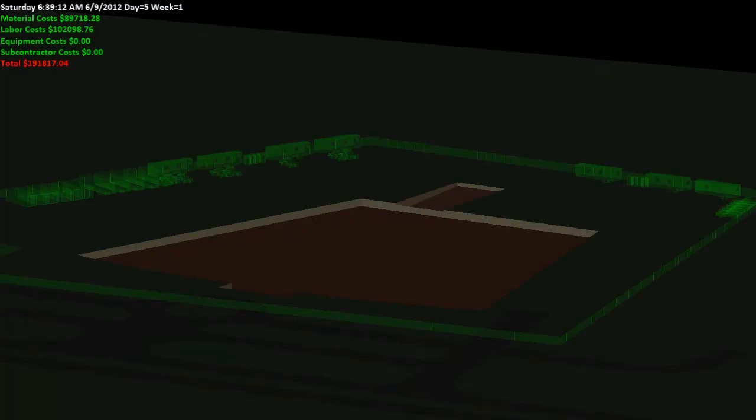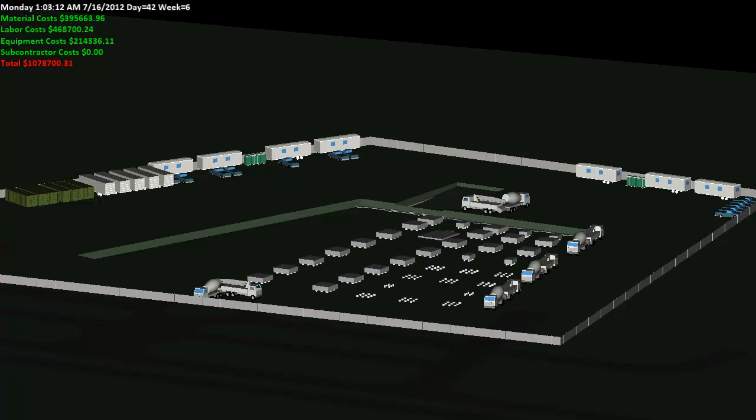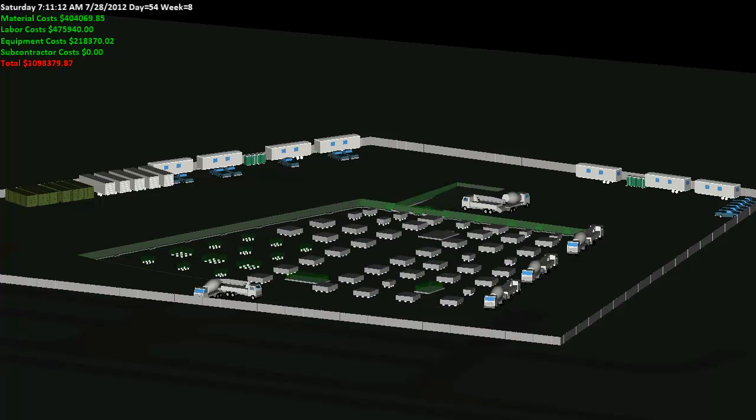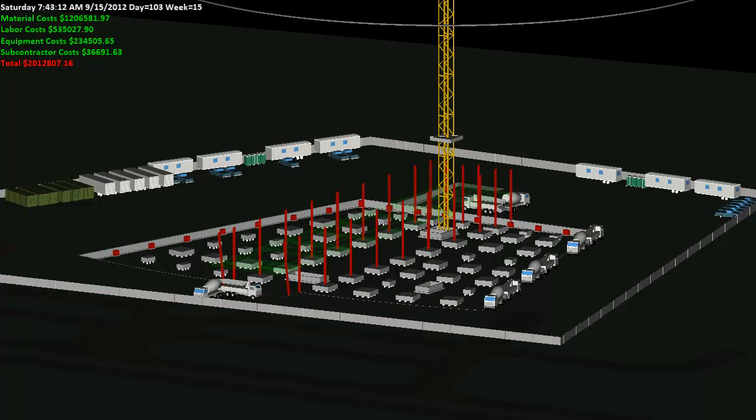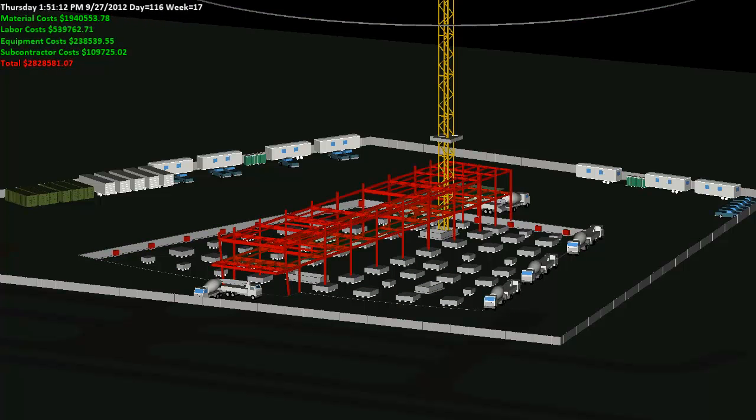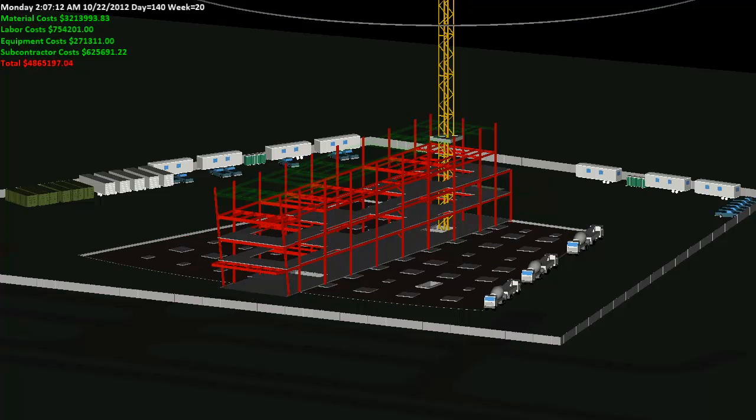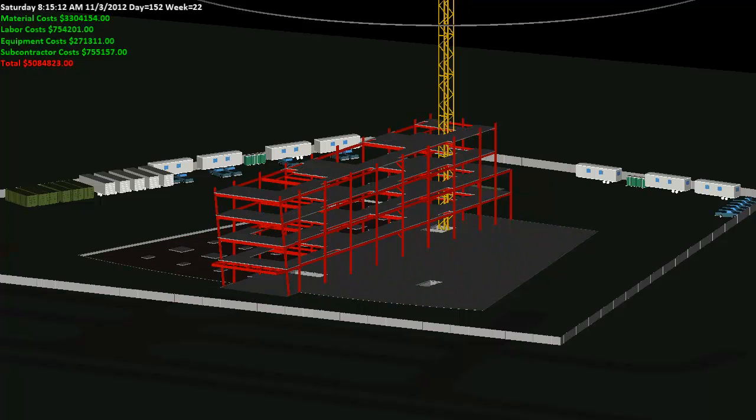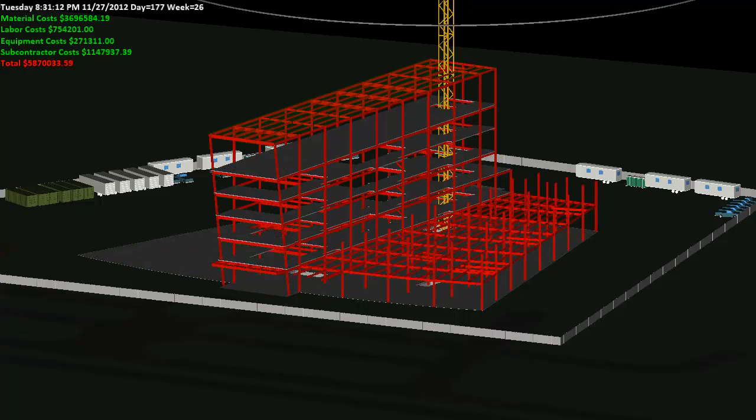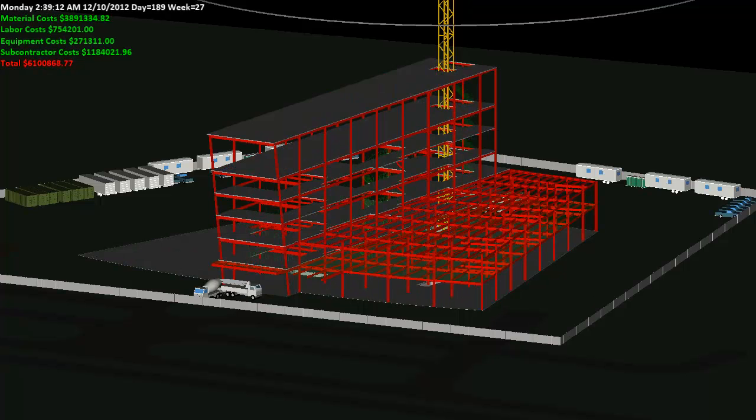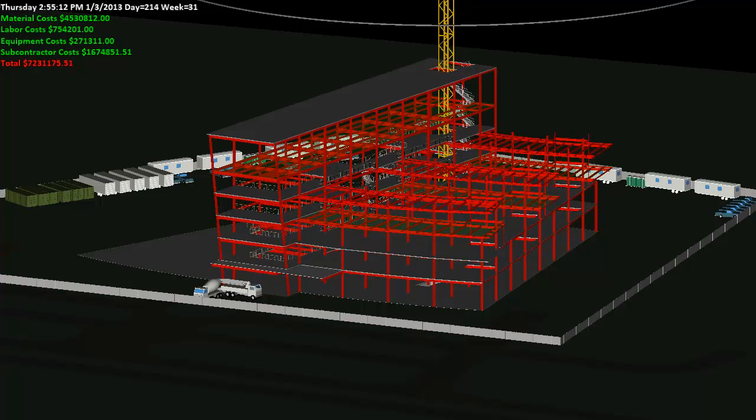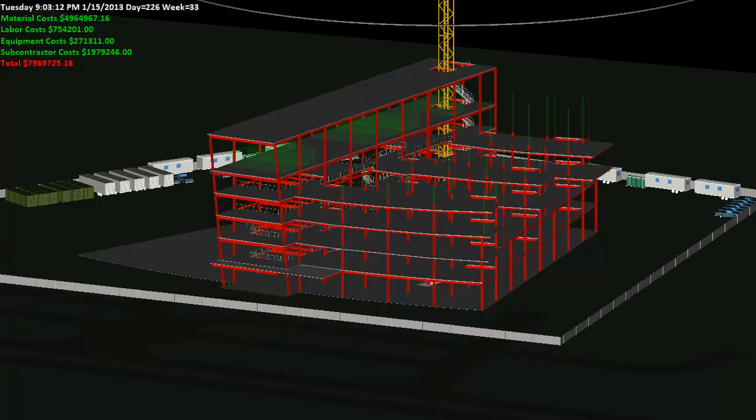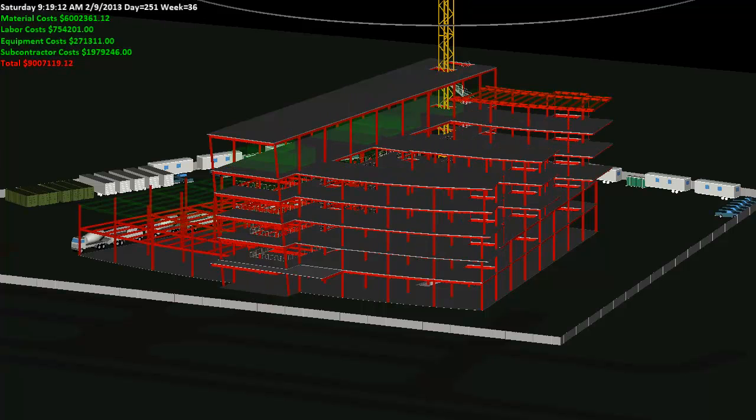The cost information can then be displayed within our 4D analysis, creating a fifth dimension of data to simulate, helping us better understand the impact certain tasks will have on our budget at any given time. The refined simulation and analysis can be reviewed to help identify any conflicts visually as the project is virtually built on the computer.